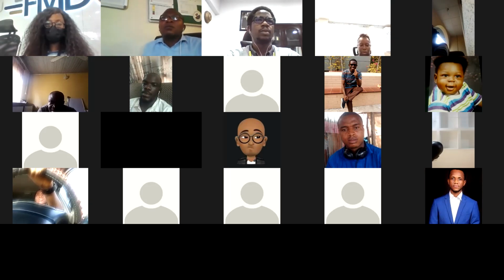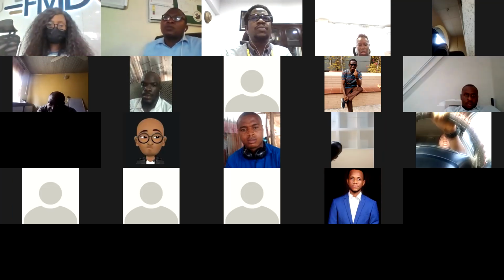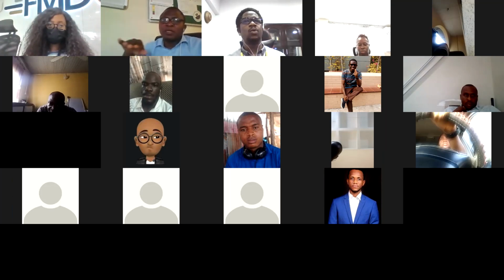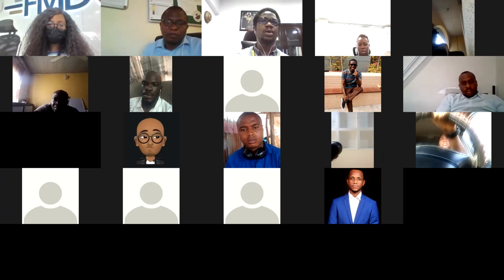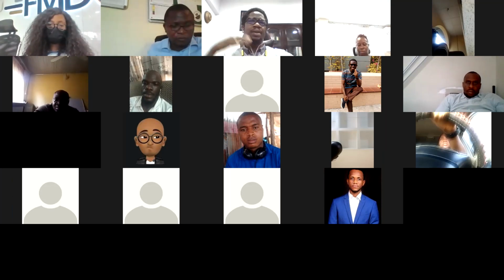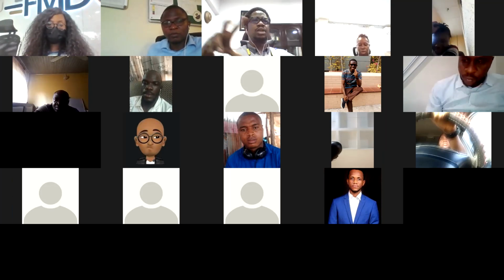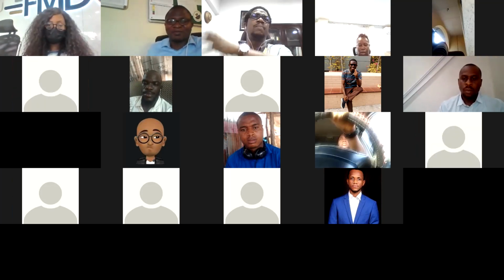That's number one. Number two, if the three vendors themselves found a way to know each other, and over a beer parlor discussion say, so how much are you going to bid? 650. How much will you bid? 700. Okay, this time let me win it. Let me bid 600 so that I'll win it. Next time, when you are going to win it, I will bid higher. The next man will also bid higher. You will be the lowest. They will be arranging those things behind your back. That is also fraud, but it's coming from outside.